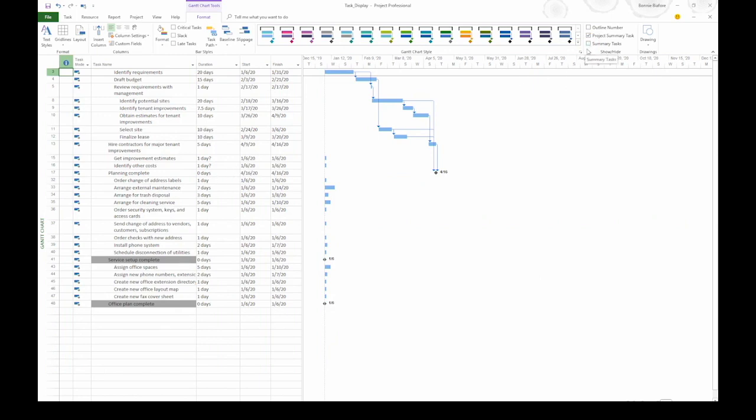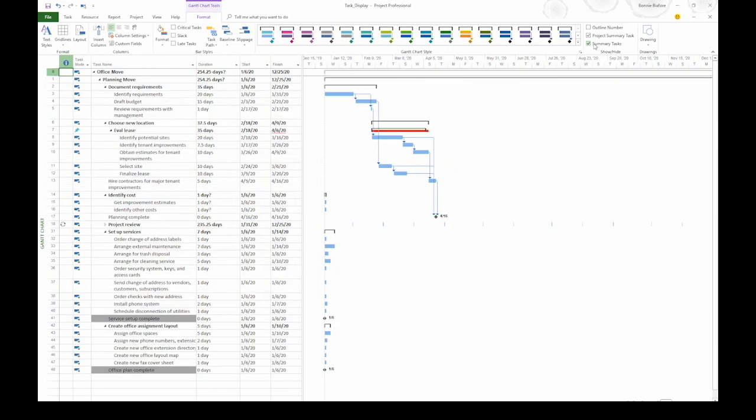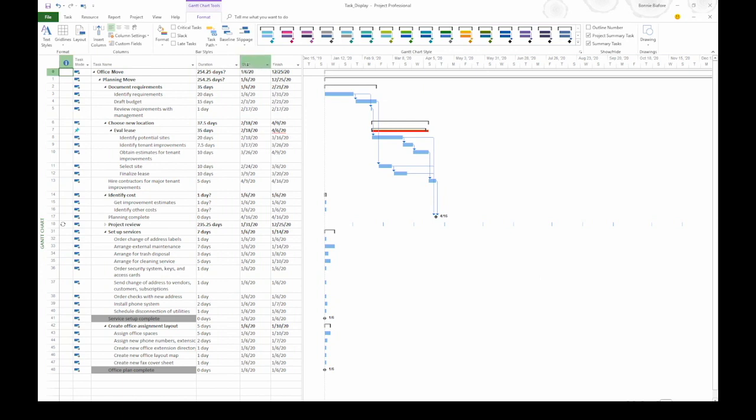Then, when you're ready to see them again, you can turn the checkbox back on. The project summary task is a special task at the top of the project. It has Task ID 0. It's a summary task that Project creates that summarizes everything about the project. For example, we can see the duration of the project here, the start and finish date.